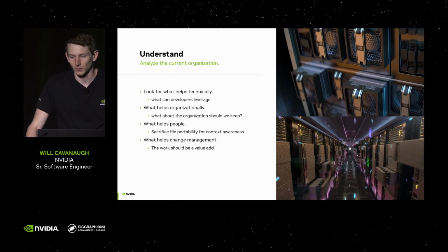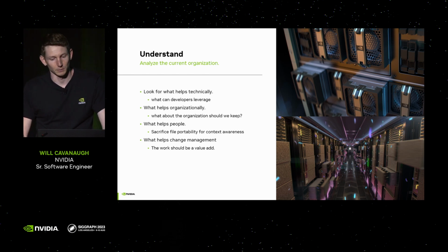Before making changes, we also wanted to know what to keep. We have a team of incredibly talented and experienced artists, and they'd already been delivering shows successfully with what they were working with. So we wanted to meet with them and hear postmortems on parts of the pipeline for Sing, which was their most recent show at the time, and took stock of what was working well. While it might seem obvious, I think this step provided a lot of value, not only because it gave a basis to build on, but also because users are always more receptive to a new system if aspects of it are familiar.